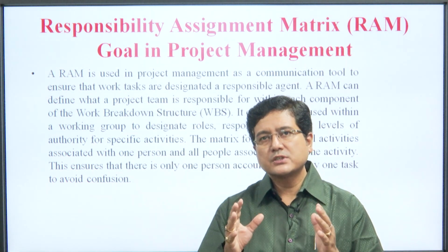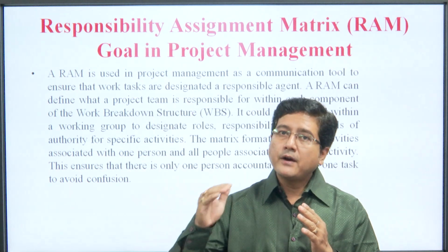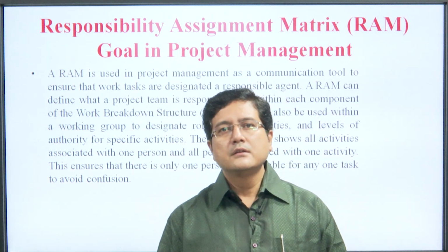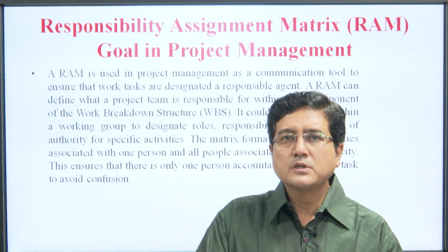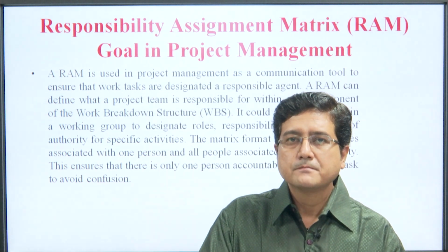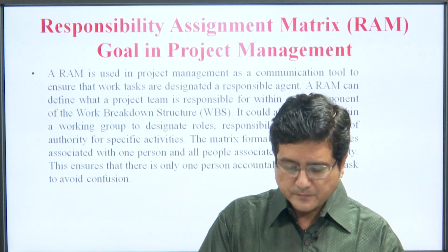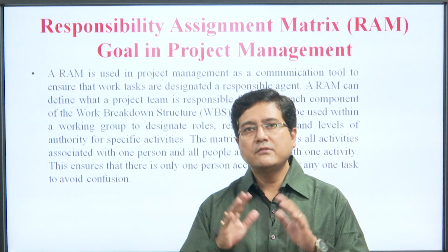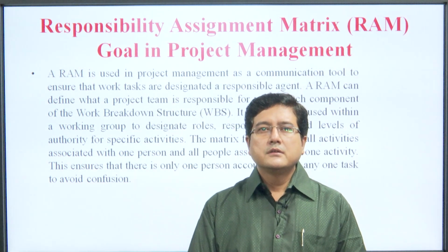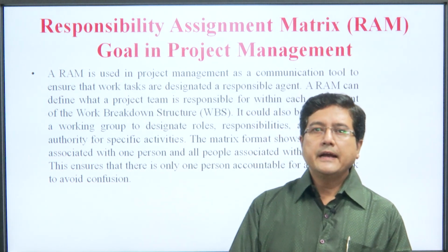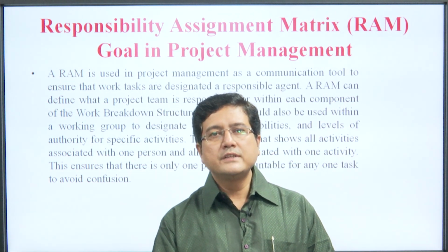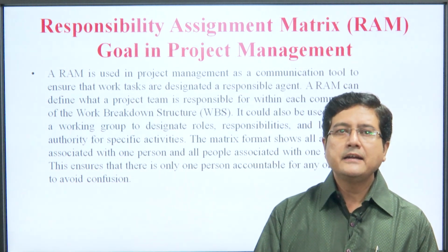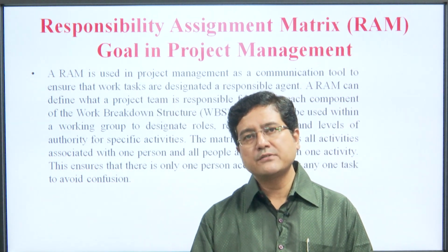In the work breakdown structure, where we define each different task, each task is under a person who is responsible to complete that task. So, initially we need a work breakdown structure, then we assign the team. It could also be used within a group of designated roles, responsibilities and levels of authority for specific activities.